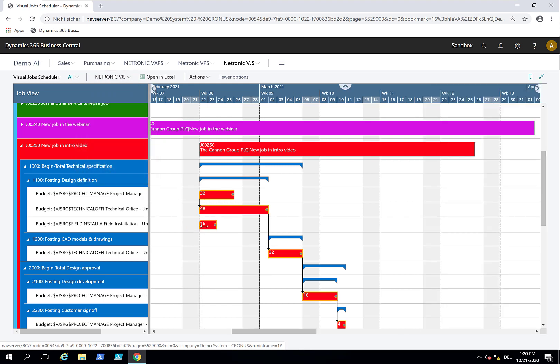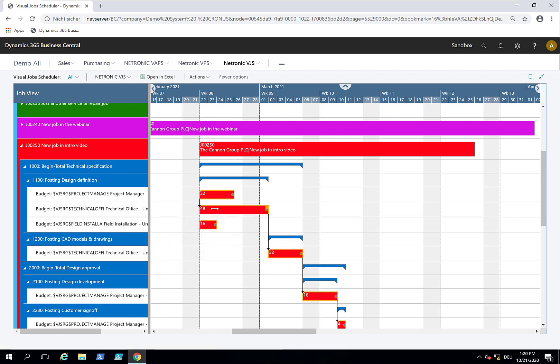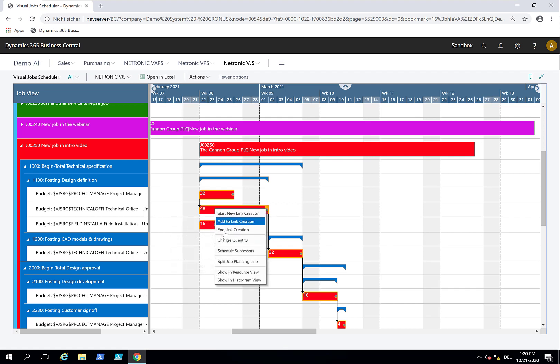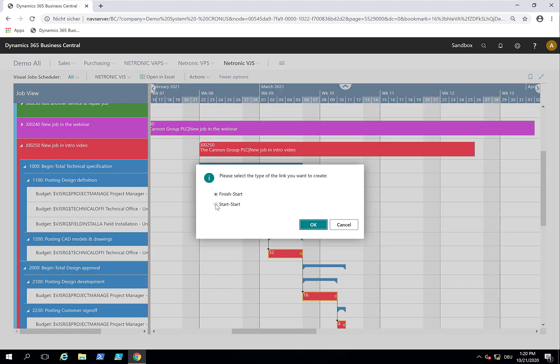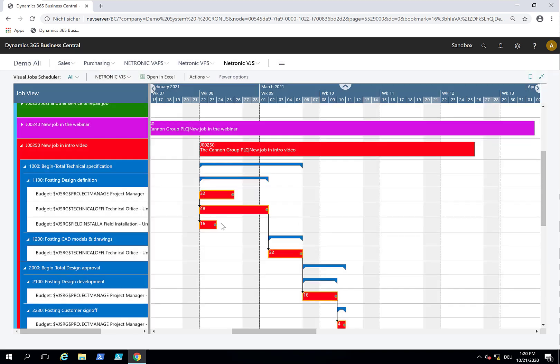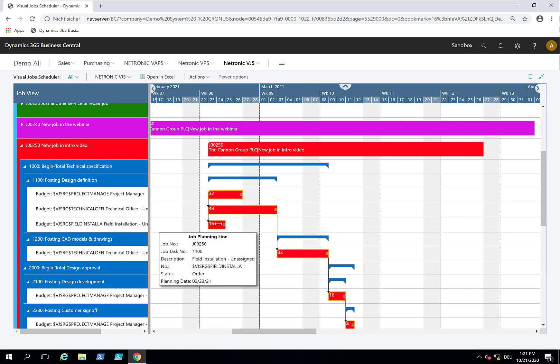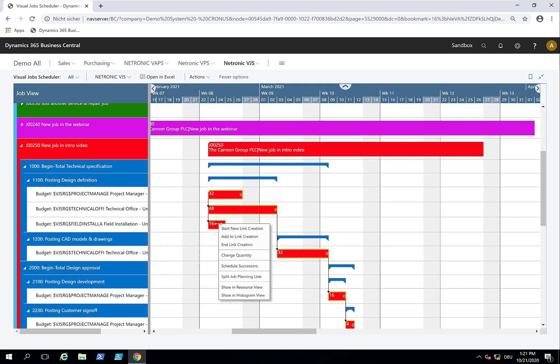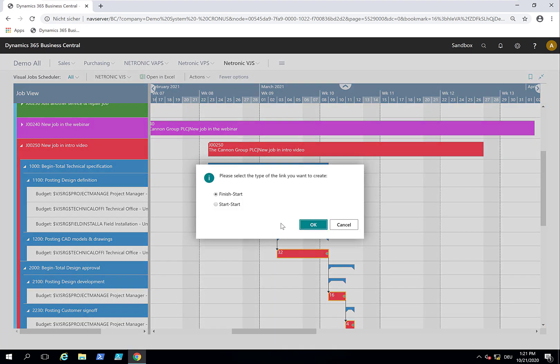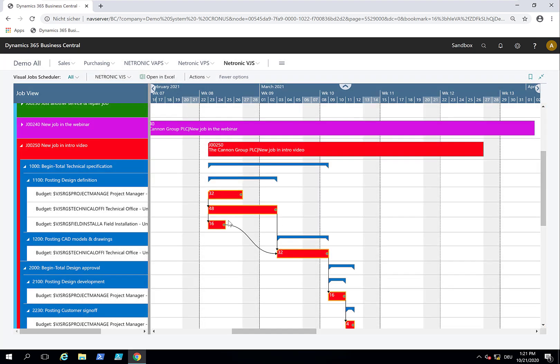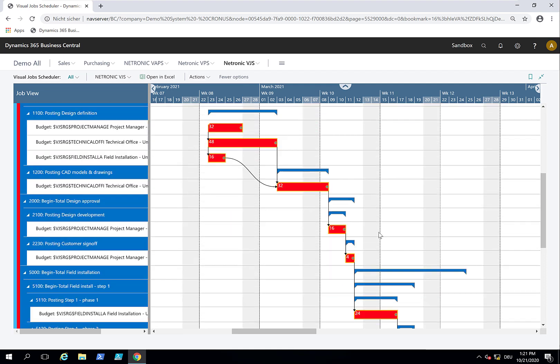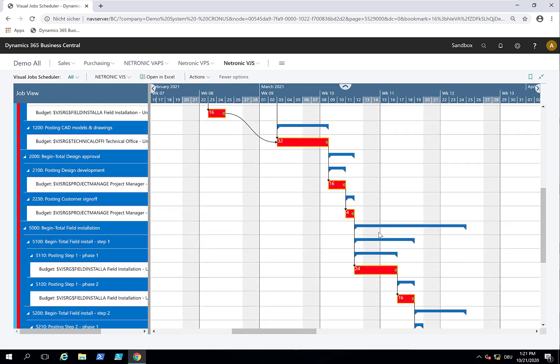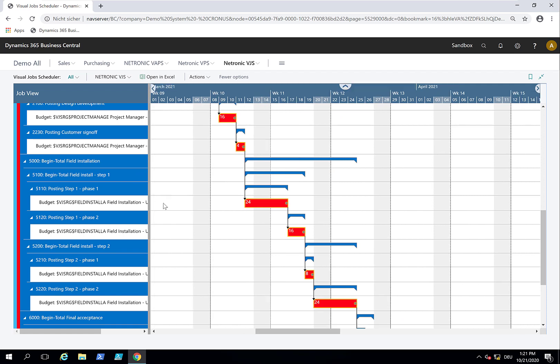We added this new job planning line. It is not part of the link structure, but we can say it needs to start in parallel with this. We start a new link and end the link definition here. This is actually a start-start link. Now these two are dependent on each other. If this first one moves, then this one moves and then this one moves. This also needs to get finished before they start, so we define a finish-start link so that we have this dependency defined.